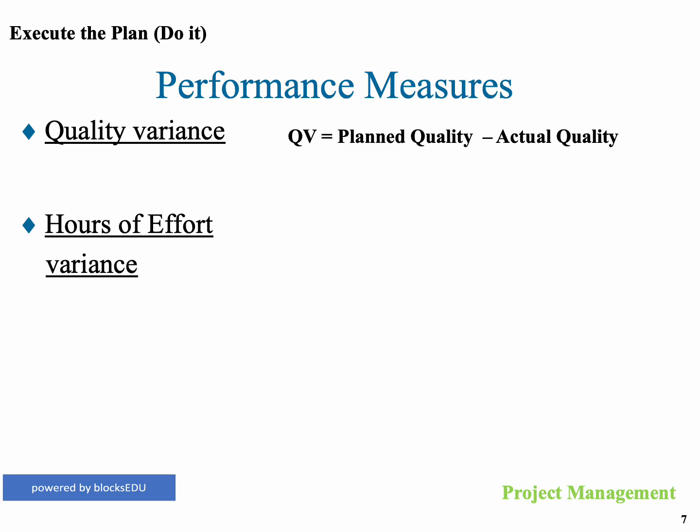Next, we have one of my favorites, which is hours of effort. I like hours of effort compared to cost, because cost is really a multiplication of hours of effort times a certain rate. Rates can always change. So the hours of effort is something that I like to see for each task. Basically, the planned hours of effort versus the actual hours of effort. So those are the two final things that we do from a performance standpoint.